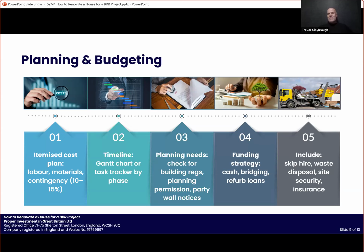Another example is if we haven't been able to break into some of the walls and we don't know what's behind them, we might have a contingency that we're going to skim, but if we have to board and plaster, it's going to cost this much extra. But most of the things we can plan, and then for some things we just add some contingency for things that we haven't thought about at all.